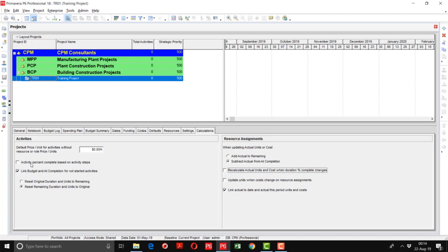You can divide this activity into different steps, like shifting of rebar from the store to the rebar yard, cut and bend, then shifting to the side. Normally, when you shift the steel after cutting and bending to the side, there is some percentage associated with these activities. So, if you want to update the progress on the basis of these steps, you have to specify the steps against each activity. In this way you can add the progress. So this option is only valid for the physical type of percentage complete.